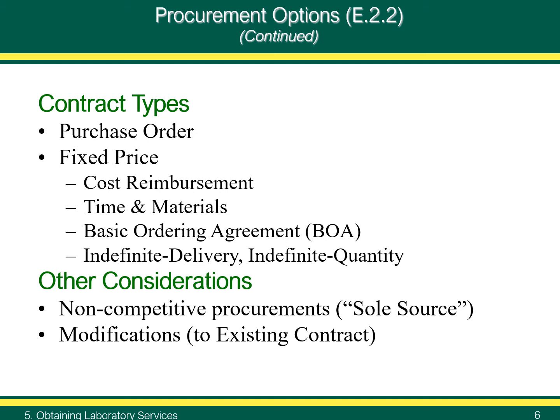Consider a contract with Acme Consultants to evaluate SOPs for tritium. This contract may not be modified to purchase tritium analyses without justifying sole source. However, if the original contract was for 100 tritium analyses, and it contained a provision that the government could optionally order 100 strontium analyses, a modification may exercise that option.